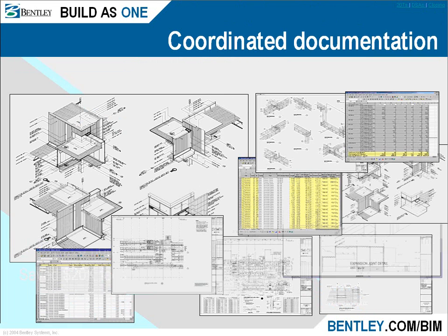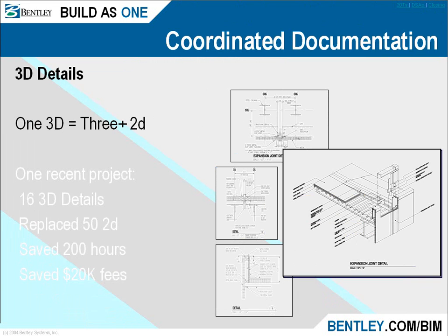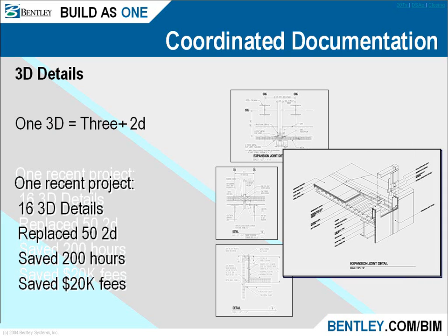In this example, one 3D drawing represented 3 2D documents. On one recent project, 16 3D details replaced 50 2D documents, saved 200 hours, and approximately $20,000 in fees.